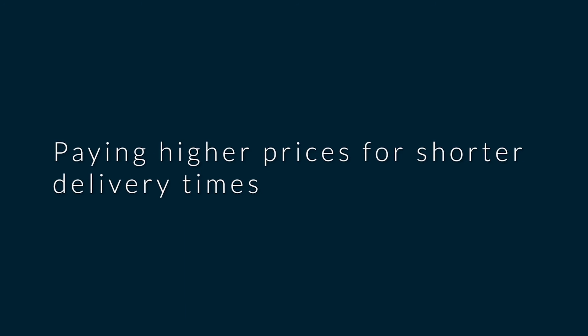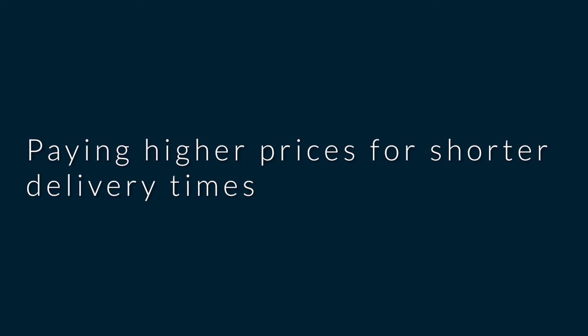And when it comes to lead time, the question becomes, what are some of the things that we can do to shorten the lead time? Some of the things you can do will include paying higher prices for shorter delivery time. Of course, you also have to look at the cost benefits of doing that. So just because somebody says you can deliver in 5 days, but if you increase your price by this much, then you can deliver in 2 days, you just don't say, okay, deliver in 2 days, I'll pay more. You have to look at the cost benefit analysis.